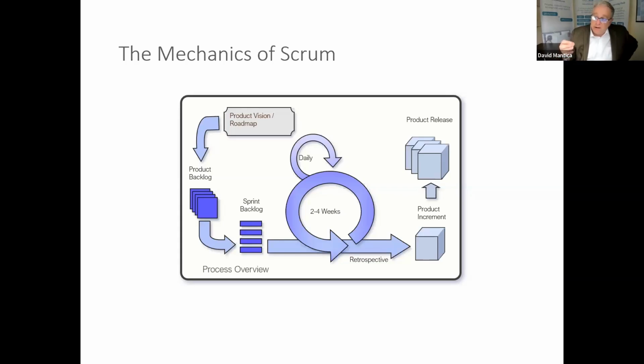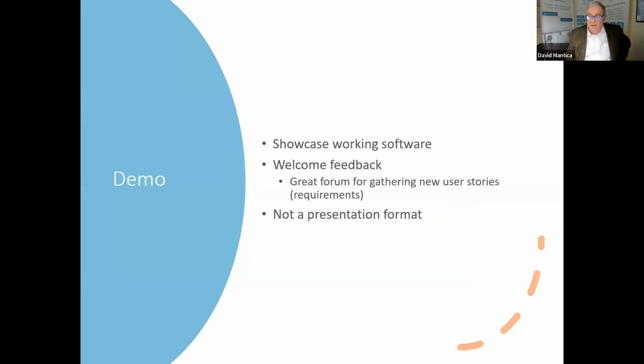And before we conduct the next iteration, we're going to ask ourselves how we did. That's the retrospective. How did we perform as a group? What are things that we can improve upon? What skills do we need to bring into the team? What are we missing? Do we need more details from the product owner? We're feeling a little uncomfortable with how things are being valued. Our point system is off a little bit, and we'll get into the point system shortly.